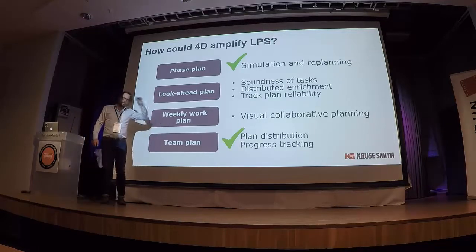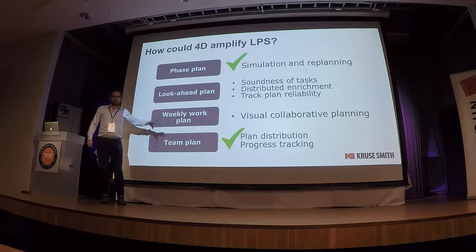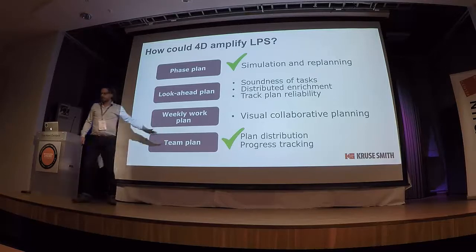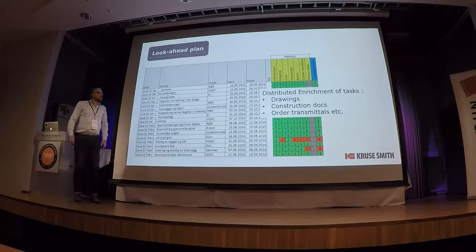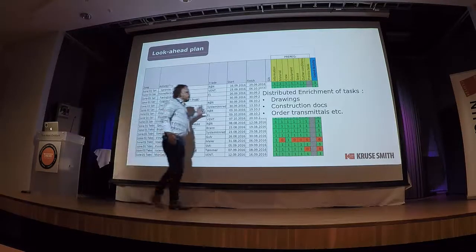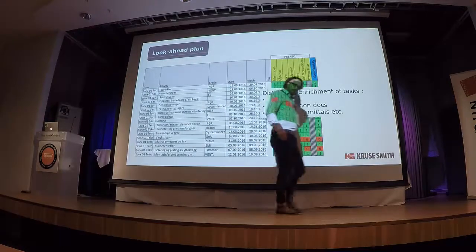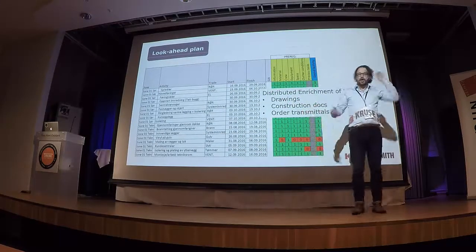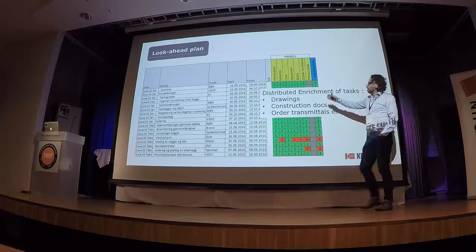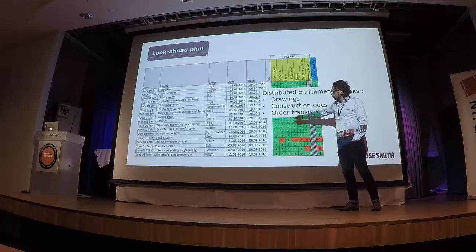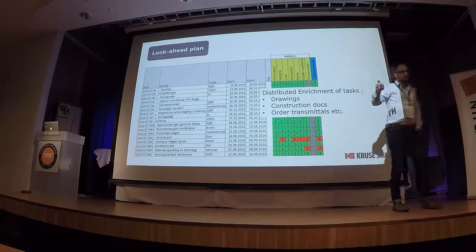From what I've seen today, most of this is already in place. I think using the site application, we could do something that could really give us the feedback from site. But what I haven't seen so far, maybe some of you have seen it, is what we do with the look-ahead schedule. We pull it out to Excel. We have a formula symbolizing a formula behind every constraint.